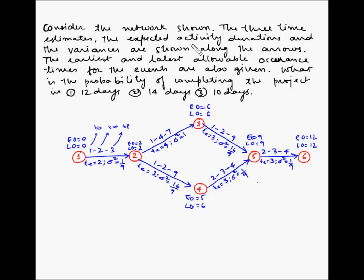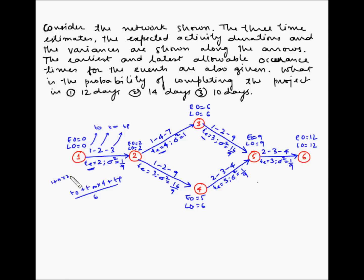We have also been given the expected activity durations, which is the Te, given for all the activities. This is calculated by the formula: T_O plus T_M multiplied by 4 plus T_P, all divided by 6. For example, (1 + 4×2 + 3)/6 = (1 + 8 + 1 + 2)/6 — that is 12 divided by 6, which is 2. So we have the expected duration for that activity as 2. The expected activity duration has been given for all activities in the same way.